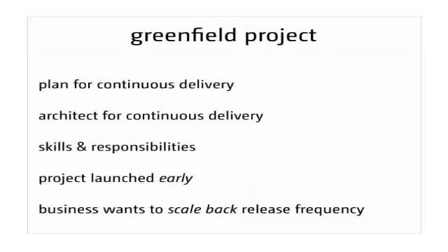They put HA proxy and Nginx in place. They started from the beginning to consider how it would be possible to create production-like environments for the developers, so the developers can be testing right from the beginning on production-like environments, even on their machines using virtualization. They created stories right from the beginning for setting up the deployment pipeline, setting up the environments as part of the inception of the project.